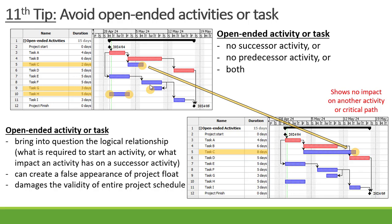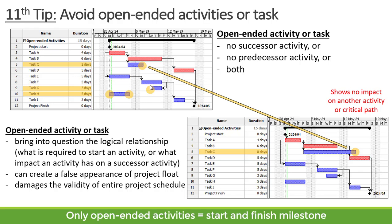The only open-ended activities that you should be using in a project schedule are your start milestone and your finish milestone.